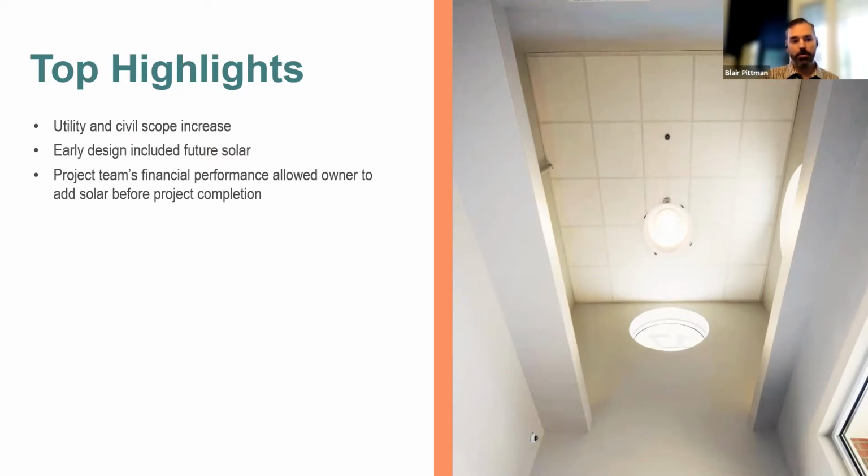As a highlight to that, we just didn't do well on our due diligence of where that scope was. There was previous design work done, and as we got deeper into it, we learned that the scope of that work provided to us changed. So we were able to incorporate it, but it was certainly probably the most interactive we had to be with the City of Durham in discussing schedules and costs, because that was a scope change to the project and one that did crunch us at the end, getting the certificate of occupancy while getting that last little bit of work done.